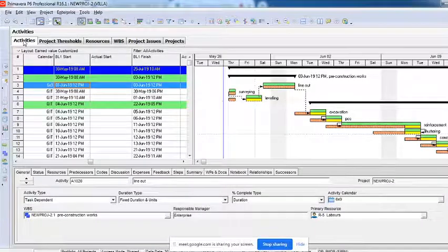When you look into that activity, once it has been raised, it will give you only the identified date. Now as an engineer, you will have to take that issue once it is generated, give the resolution dates for it, prepare a response plan for that particular issue, and then within the approved resolution date, you will have to close the issue. Once the resolution date comes, it will generate a report and tell you how many issues there were. There's a manager who will come and see what happened to those issues. All the issues which were generated or open have to be closed, meaning issues have to be resolved.